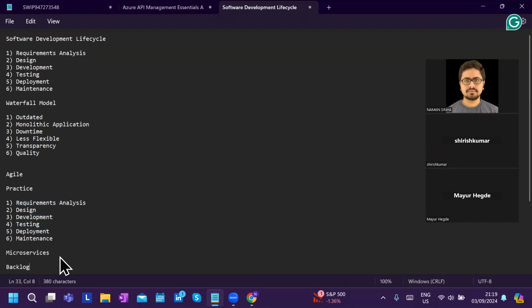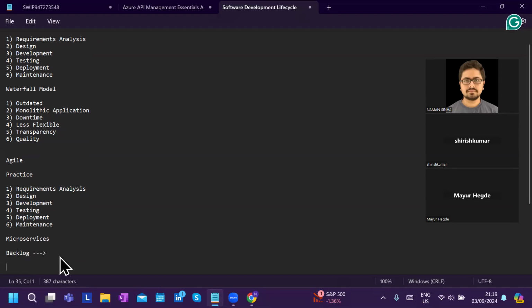Now, from here onwards, your terminologies of Agile start. So the first thing that you need to know is backlog. Okay. So they push it to the backlog, and then they say, right now we are working on something, but we would prioritize it as soon as we are done with whatever was promised. So next, Accenture has work in the pipeline. And while Accenture starts building the second set of requirements, the first set of requirements are already being used by HDFC employees. And at the same time, when you use it, you also start raising issues and bugs, which Accenture has a dedicated team to fix.